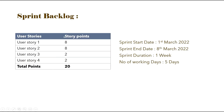Let us consider a sprint backlog which has 4 user stories. For each user story, story points have been assigned, totaling 20 story points. The sprint start date is 1st March 2022 and the sprint end date is 8th March 2022. The sprint duration is 1 week, with 5 working days, excluding Saturday and Sunday.